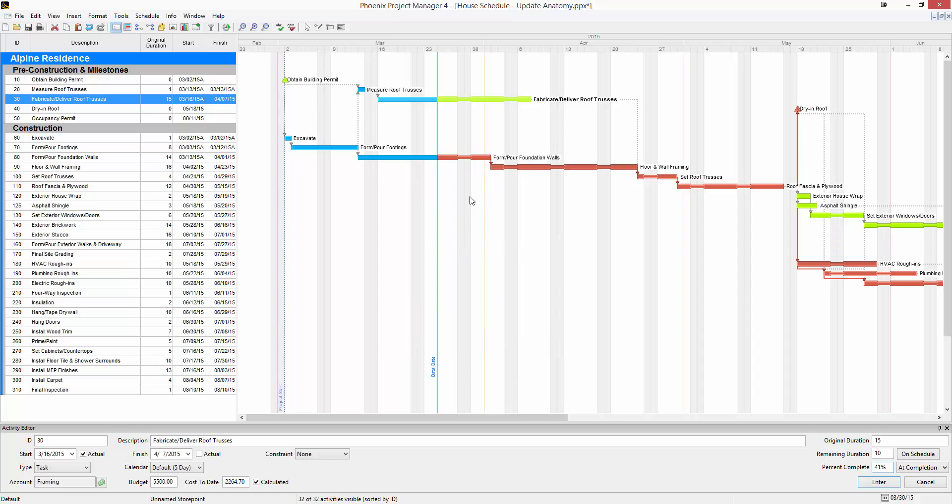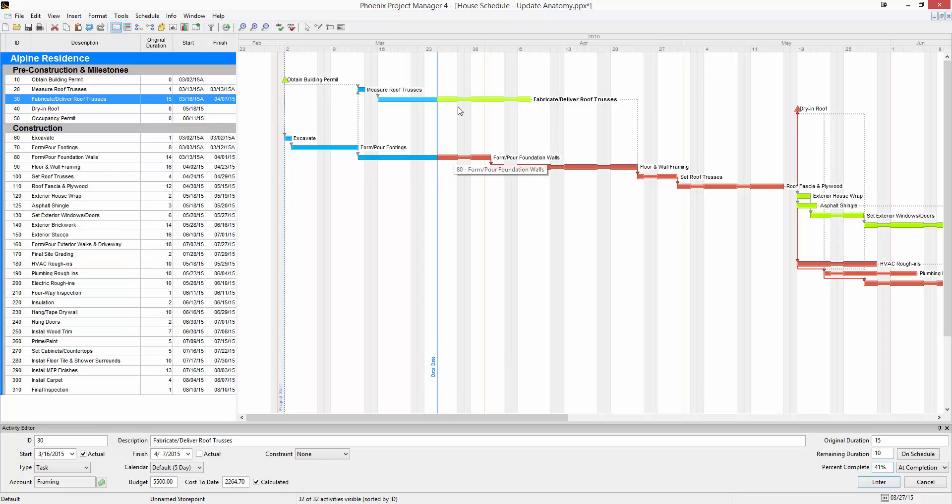This project has already been updated. You can see here the project start line and over here the blue data date. The blue color on the bars represents work that has actually been completed. The red or green represents work remaining.